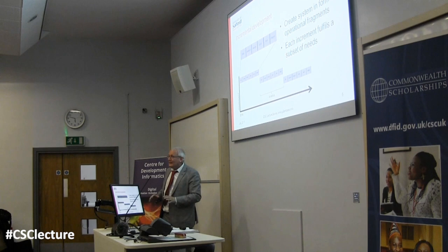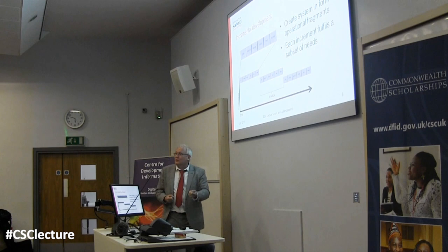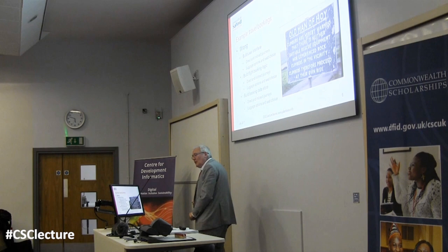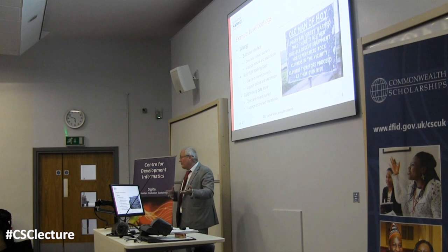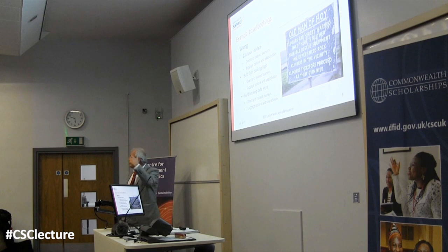What we're suggesting here is that an increment fulfils some subset of needs for somebody. So it's a functioning, working fragment rather than some isolated bit of something that requires other parts to do anything meaningful. I'll expand on that idea. Let's think of travel bookings. The particular example I'm thinking of is that in the UK, we have a very large railway booking system, and I was lucky enough to do a research project with some of the people who built that, in India as it happened. So here we're talking about travel bookings. It could be railways, buses, or flights.